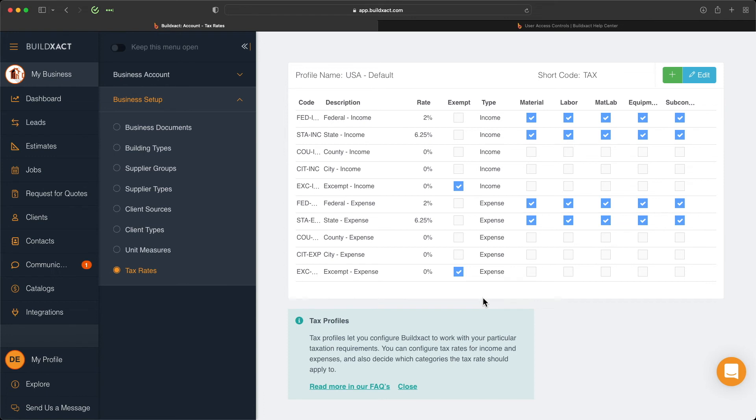Once that's set up, this is now going to be used globally across any newly created estimates and jobs. More specifically, once I've edited this tax profile, it's important to note that this does not apply retroactively to any created estimates or jobs.